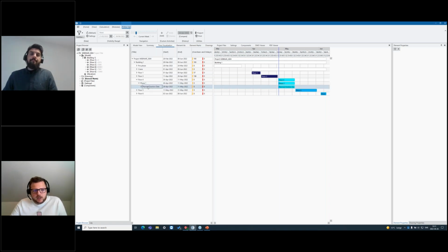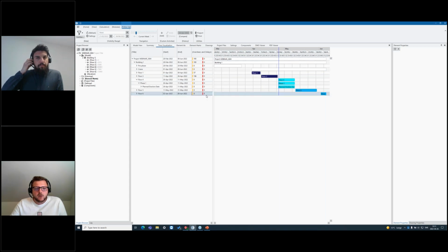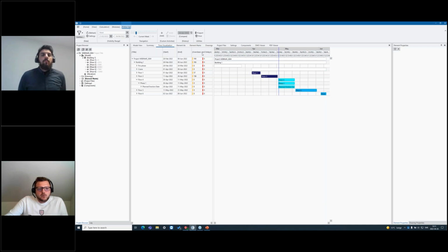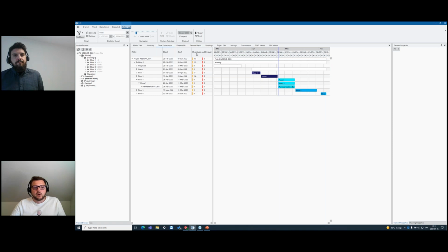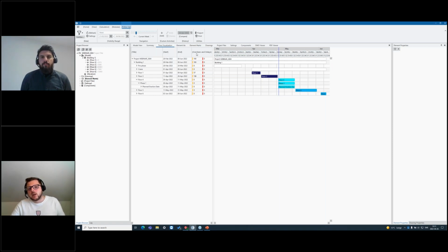And one thing that I forgot to tell you about earlier is that you see here in the Gantt chart we have these overdues and delays, and that's also highlighted for easy access to information. So the difference between delays and overdues. Overdue is, let's say that you had a transport planned Friday last week, but in reality it was postponed for some reason, so it went to the site yesterday. Then it's an overdue because it's a delay, but it's nothing that we are waiting for. The element either was produced or was delivered anyway.